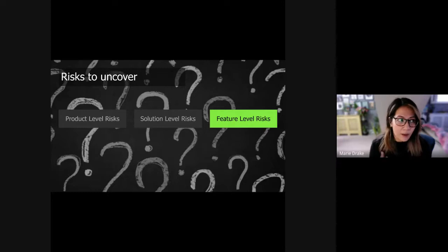Again, if you're developing a new feature, are there any existing features that might be impacted by this new feature? Because if this new feature is quite connected to existing features, then you might want to raise that, we need to be careful about doing some changes in this area. And if there are going to be impacts, then we need to make sure that we have some regression testing in place to make sure that the existing features aren't impacted.